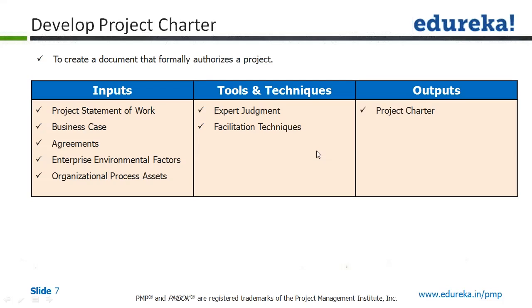If we are executing this project, for sure there is a purpose behind it, and that purpose is justified in a business case with the output it is going to produce, and it would also mention the benefits which it is going to produce. That output or benefit would be the justification of that business case. When we start the project, the first document which becomes the basis is the document called project charter.